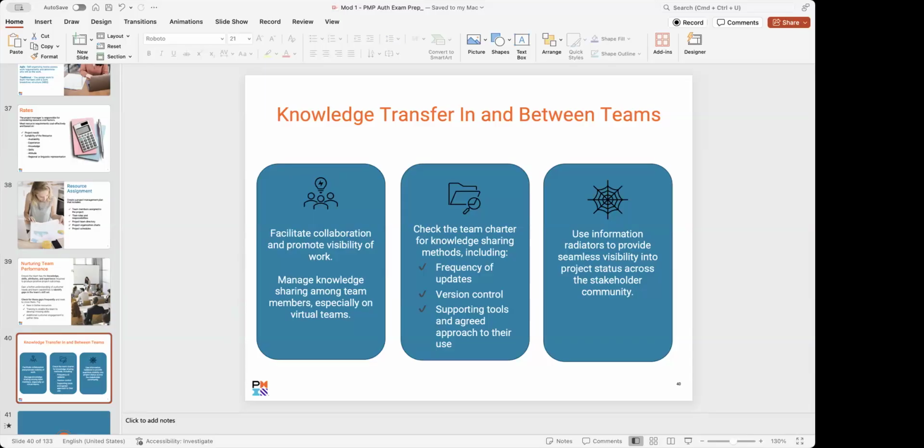Because we actually completed and managed the project for 2024, and now we need to hand it over to them for 2025. So we did some knowledge transfer. We shared documents that we put together that helped us with understanding our project, and we put documents together with some lessons learned, some things that we really did not do well, and had to pivot mid-project, and we shared that as well.